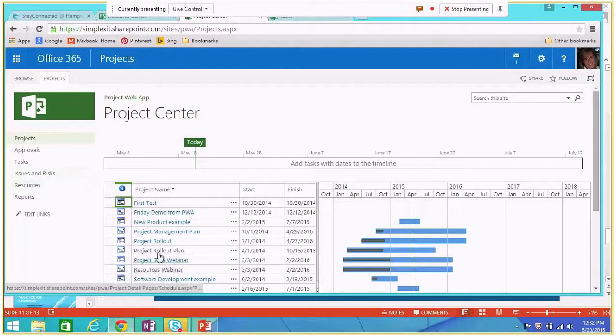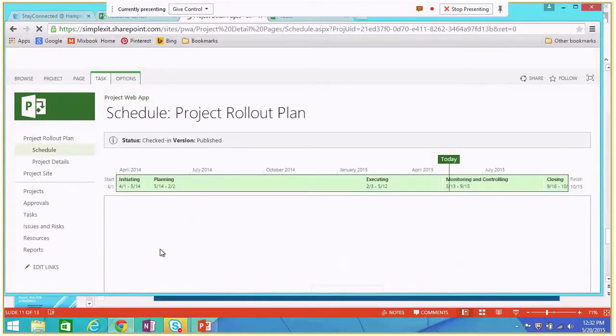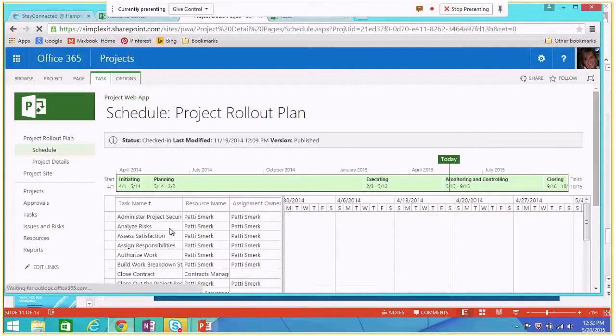The detail that you saw in these projects varies from project to project. My key piece of advice is that you certainly don't want to spend more time managing your project schedule than you do actually working on your project. So if your tasks are things like, install a server, that's fine. Keep in mind who's going to be working on the task. Somebody might be okay with a task that says, install server.